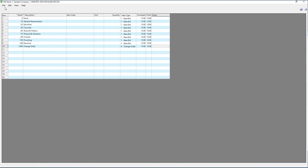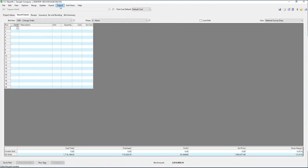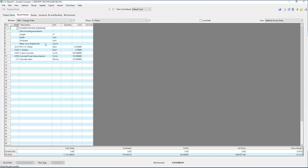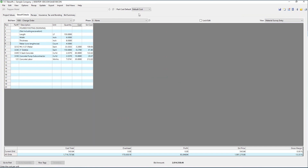Now let's go back to our original estimate. Here I'm setting up a change order. You can see that I can flag that to show separately from the base bid, as well as enter the unique overhead and profit. Rather than enter the information manually, I'm going to import a grid that was previously created and saved. Individual grids or entire takeoffs can be saved to be used as templates. Enter your values, and then simply calculate the takeoff to extend all of the quantities and costs.